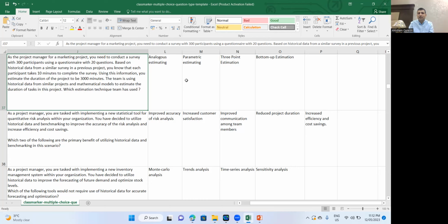Based on that historical data, you know that a participant took 10 minutes to complete the survey, which had 20 questions. Now you need to do it for 300 participants, so you multiply, and you get 3000 minutes for all the surveys to be completed, right?